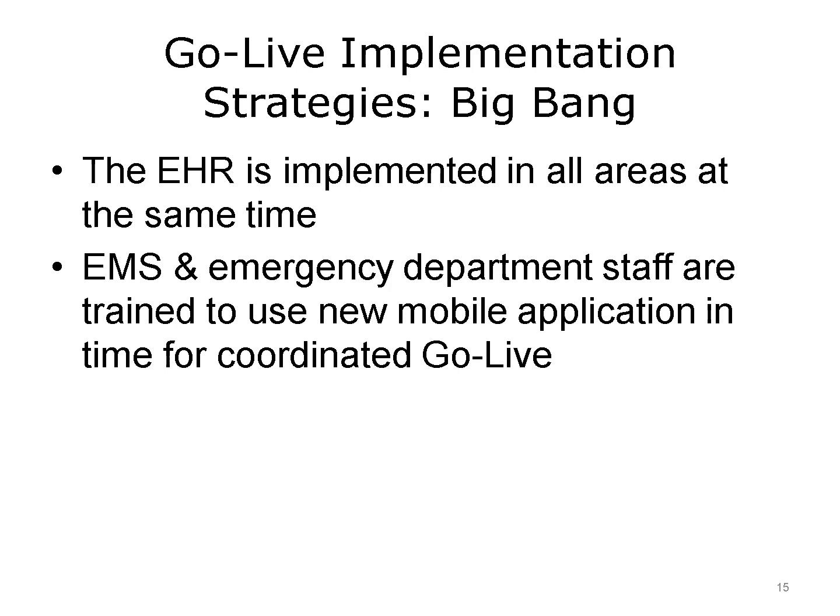Another example would be the implementation of a new mobile application that allows secure transmission of EKGs and video between EMS, or Emergency Medical Services, and Emergency Department, ED, physicians. An important consideration when deciding whether to use a BIGBANG approach is how many sites are involved. Consider the difference between an implementation for only one site and one that must be completed across several sites simultaneously for a BIGBANG. In the EMS-ED example, the project would entail the training of EMS staff in many different locations and shifts on the new application in time for GoLive.